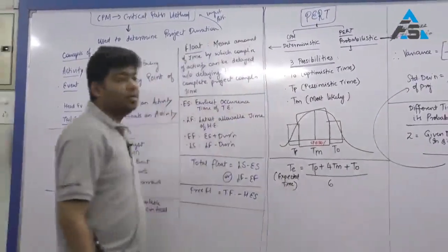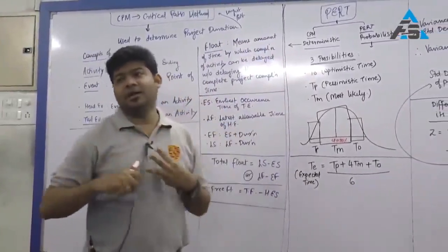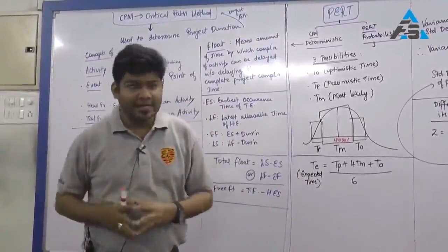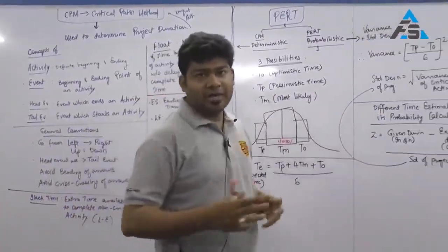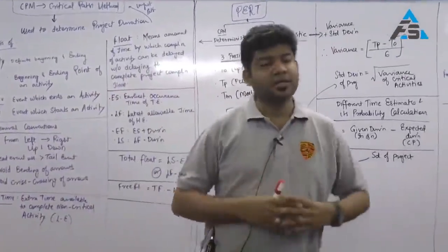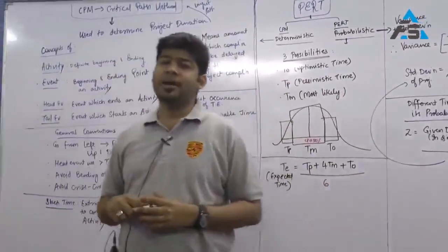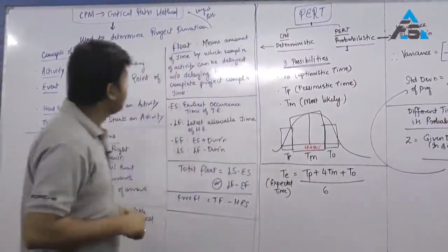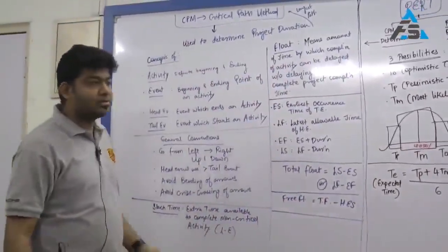Anyways, moving on. Now CPM PERT is divided into 3 parts. One, CPM, calculation of floats. That is what we will term it. So one part is that. Second, part 2 is PERT, wherein we have a lot of calculation in terms of probabilities. And third is crashing, where we try to reduce the critical path and at the same time also reduce the cost that is involved. So here, first in line is the CPM, critical path method.